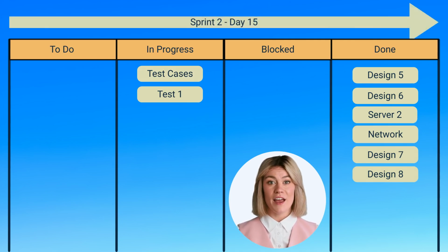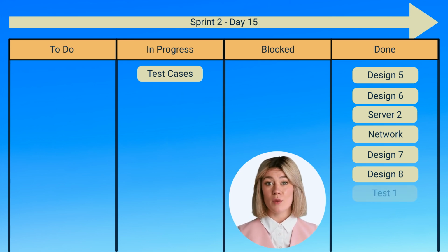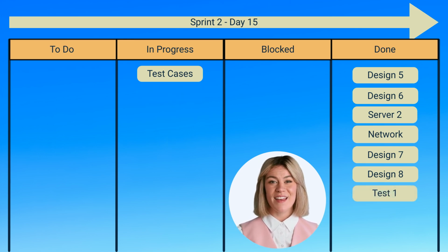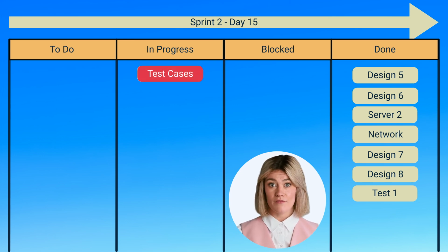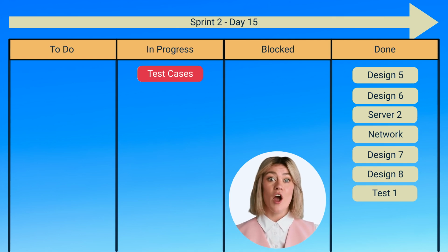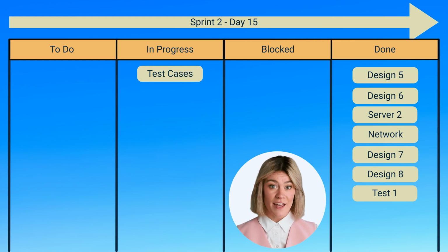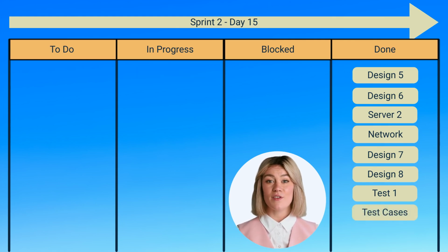After 3 weeks, we are now on the last day of the sprint and the testing work package is completed, with associated reports being delivered to the production environment. That's an early benefit. However, we just realized that we can't complete the test case work package as we ran out of time. We'll need to add another test case work package to the product backlog and adjust the current test case work package before marking it as done. That's the end of Sprint 2, so what's next?